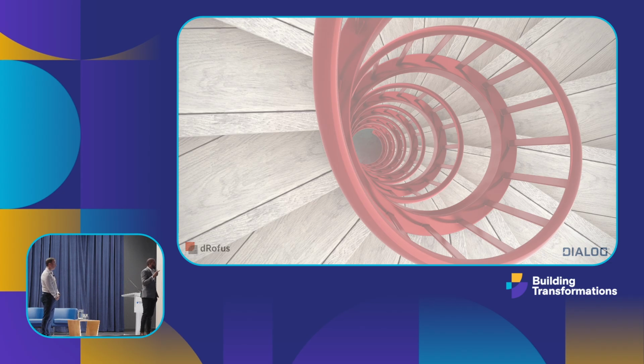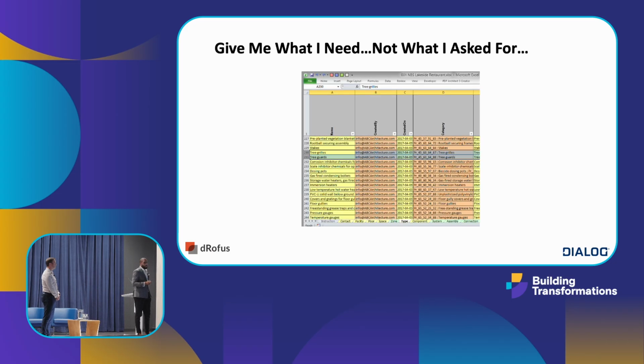So at this point, this is where the team decided that maybe that COBie schema that they were thinking of handing over to the client wasn't necessarily the best way to allow the client to maximize and understand all the information associated with the project. So they made a pivot. COBie initially was what the team thought, but maybe this is not the best thing that they could do. Wouldn't it be better if the team provided the client something that they could interact with, something that they could visualize, and then also be able to understand the data and the additional documentation and everything that happened with it? Because while the COBie would have given them the data, all of that visual aspect, which is extremely important, would have somewhat been lost.